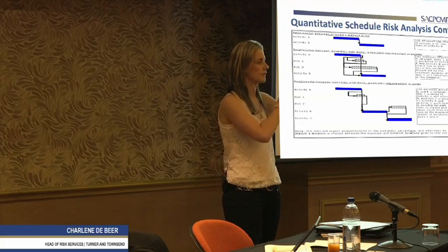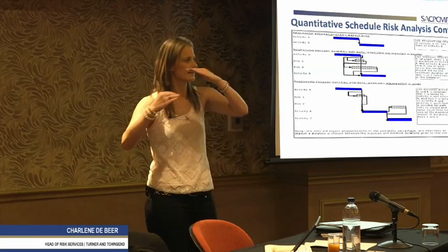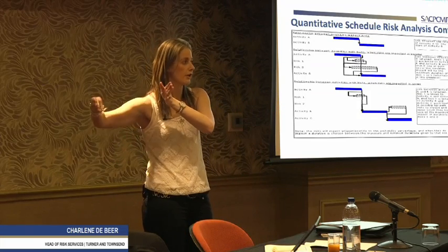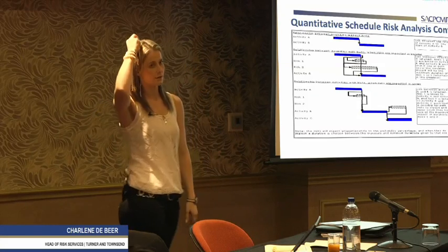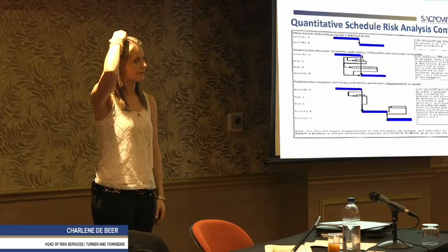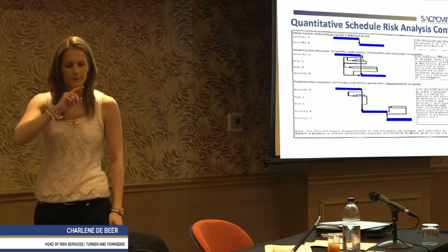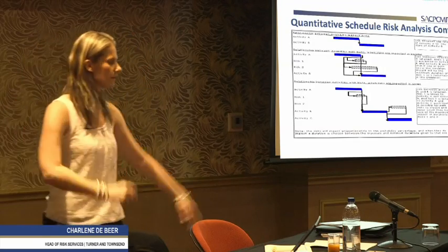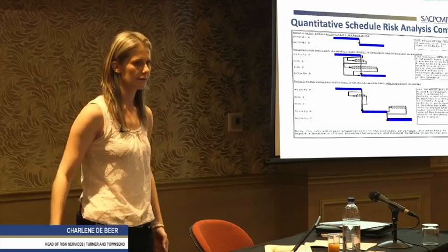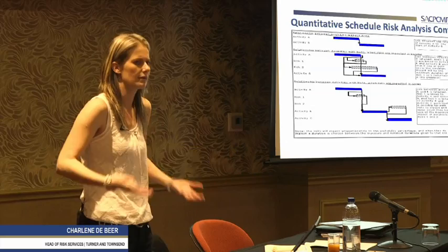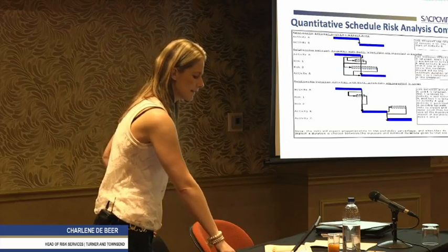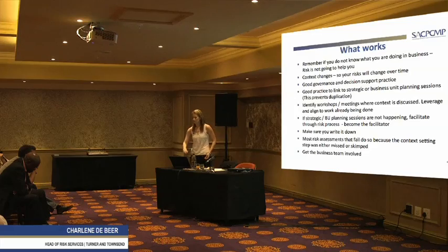But if we do the specific costs in the specific areas, and those are exactly the same areas being impacted and having a knock-on on some other trades, and we cost those trades, that costing is actually quite accurate, if that makes sense. So it has to be like for like. You can't link 10 of these risks and cost 10 other risks and then say you're going to overrun 6 months, you need this much money. It doesn't make sense. You have to cost the same thing in schedule as you do in your costing itself, in your monetary values.